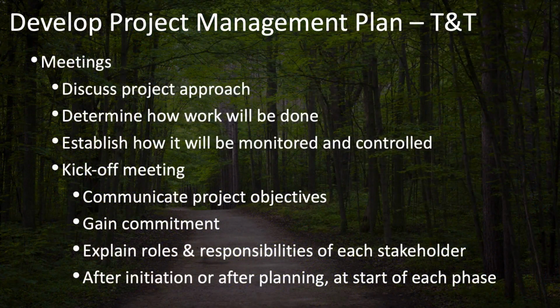The meetings category includes meetings in which you could discuss the project approach, determine how the work will be done, and establish how the work will be monitored and controlled. It will also generally include a kickoff meeting at the end of planning and the beginning of executing the project, in which you'll communicate the project objectives to the key stakeholders, gain their commitment, explain the roles and responsibilities of each stakeholder, and formally kick off the project.